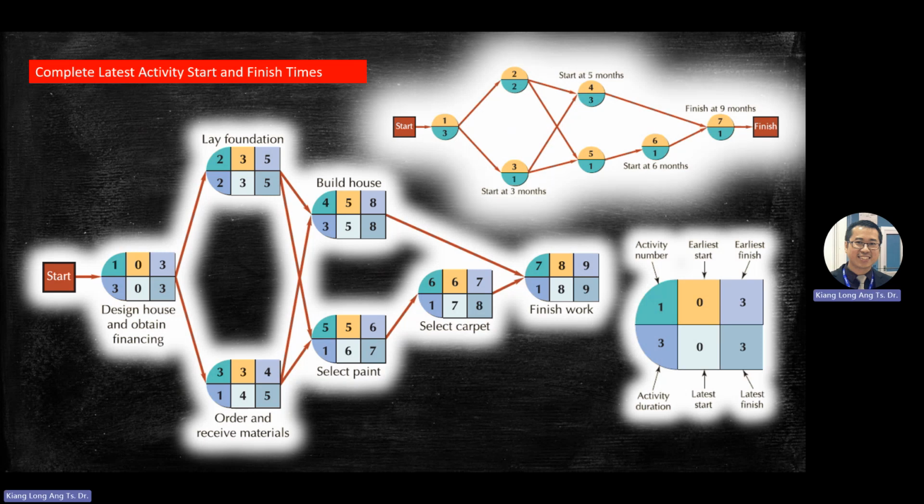You look at this column. You look at earliest finish equal to latest finish. Or you can put in the formula form. This is ES equal to LS. This one, method number 3, EF equal to LF. Okay? Same, you follow along. Okay, number 1, number 2, same. Number 4, same. This one not. This one have. Method number 3.